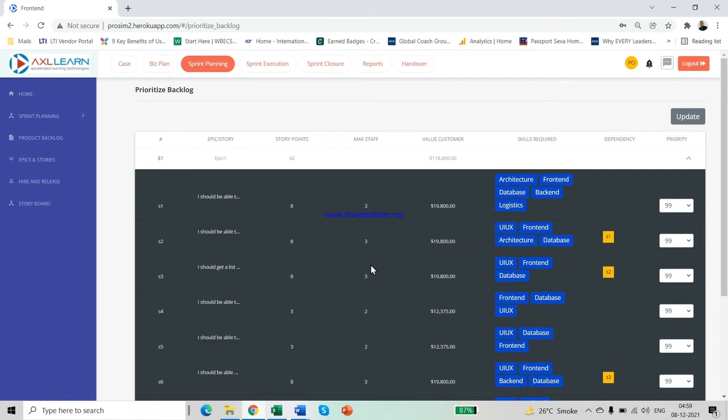In the simulator, all stories that you definitely want the team to consider for the upcoming sprint, prioritize as 1. The user stories which you want the team to take up next may be prioritized as 2, and so on. Mind you, you need not prioritize all the stories. You only need to prioritize the ones that you want the team to consider for the upcoming sprint.